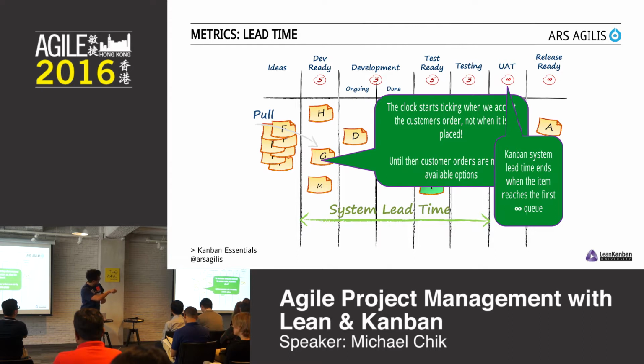Here it starts, the clock starts ticking when it goes into something that we call a development ready, or it could be anything ready queue. What does that mean? This means the team now commits, and we still use the word commit, to deliver this feature to the business. On the other hand, the business commits as well. It's not a one-sided commitment. The business commits to what we call the Spice Girl question, where we ask the business, tell me what you want, what you really, really want.